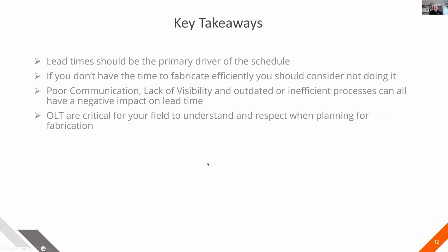All right, so some key takeaways on this, and this comes from my personal experience, and I'm just trying to share that with you here today. Some of these may apply and may not apply to each one of you, but to me, the lead times were important. We always used them with our field teams to properly plan, and so we had protocols to handle things that were in less lead time than was required, but we didn't always approve them, and sometimes we rejected them when we simply did not fabricate it because we just couldn't.